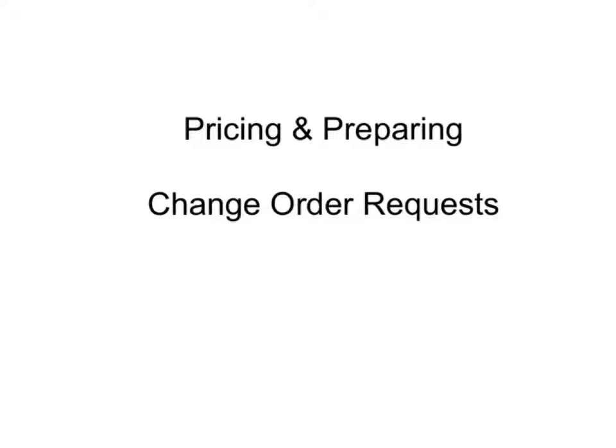Once a change to the agreement between two parties, in this case the owner and the general contractor, has been identified, it's important to properly price and to professionally prepare a change order request to present to the owner and/or the architect to determine whether or not the change should be incorporated into the contract.